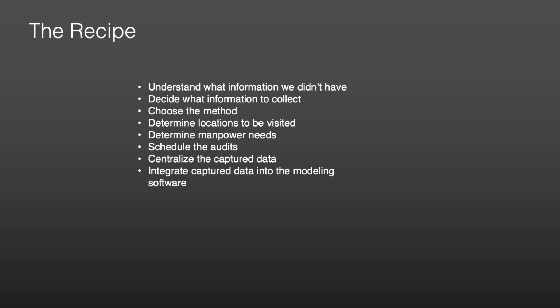Then you decide how you're going to collect that and choose the method to do so. What locations do you actually need to go and see? There's a lot of value in putting your eyeballs on what's out in the field, and then determine the manpower that you need in order to be able to do that.